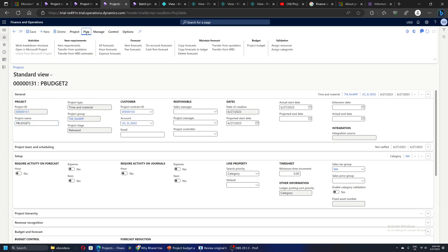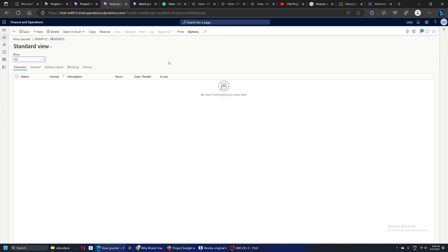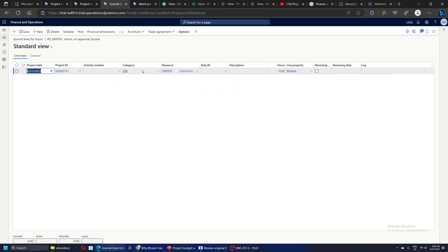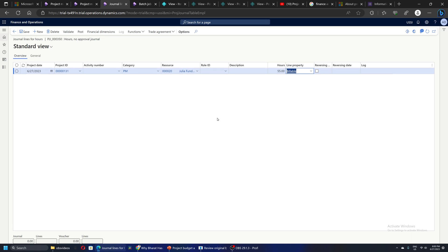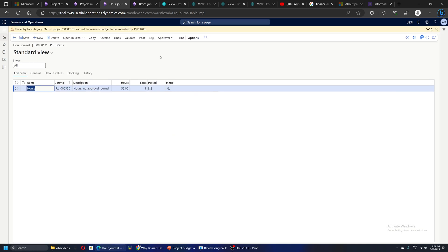Let's also quickly see how budget control works for journal lines. Let's say we create an hour journal and are booking some hours on the project. We create a new line for category PM - let's say I am booking 55 project management hours. As soon as I enter the line, it is showing me that for this category there is no budget created and approved. So budget check is active on the journal lines for a project - this is a very interesting and powerful feature we have in Dynamics 365 Finance and Operations project budget.